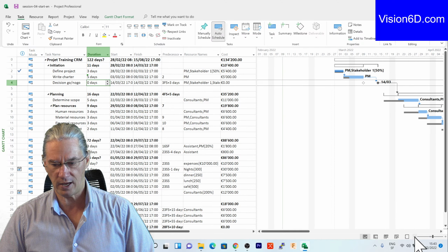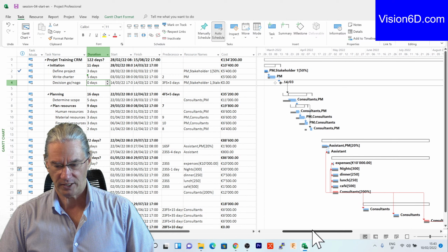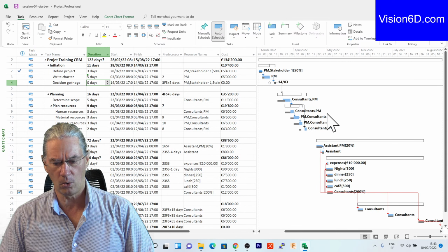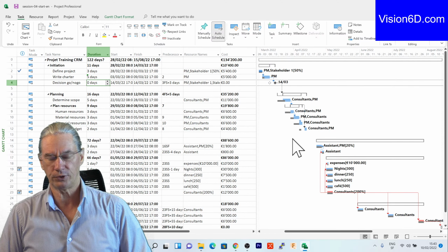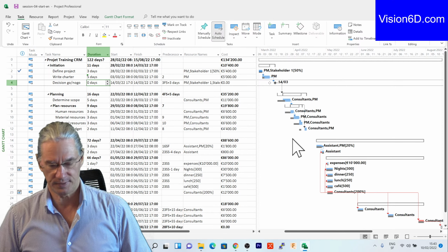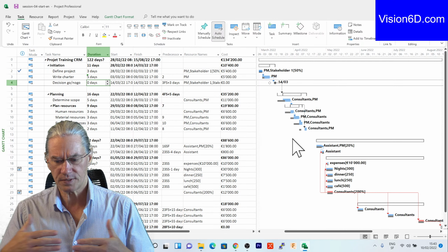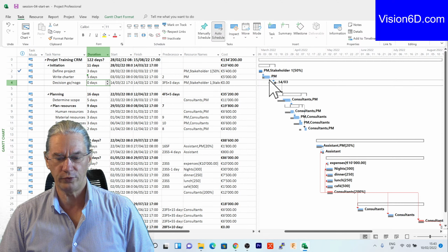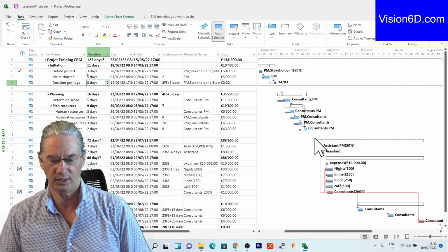And if now I'm slowly coming back and zooming out, we see that all the tasks were moved by a certain number of days. Since all those tasks are chained, of course, by moving one task by 2 days, it has a repercussion on the other ones.